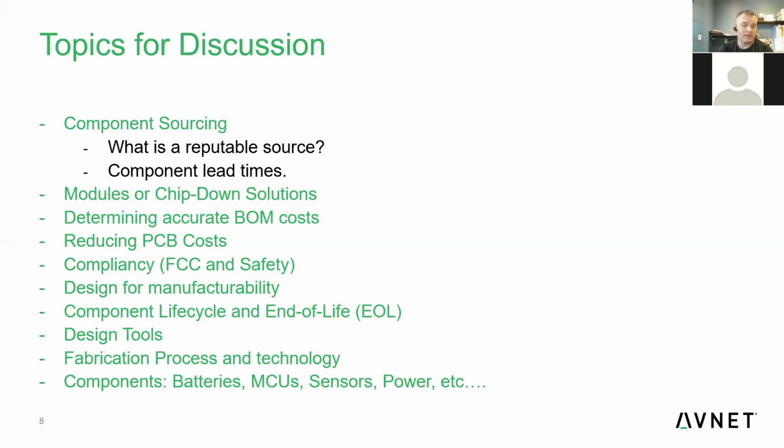So really, the best way to avoid it is to make sure that the components you're using are widely available, and not something that's unique to you or just a couple customers. That's probably the best one. After that, when you start looking at things that are getting influenced by industry trends, it's making sure that you're getting your BOMs quoted regularly, right? So send them to a distributor, send them into Avnet, right? We're happy to quote. We do it all day long, right? So send in your BOMs to us.